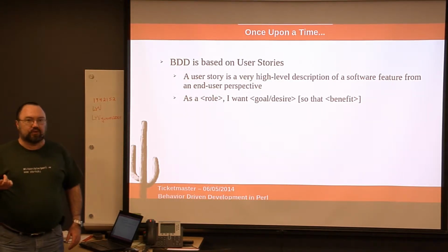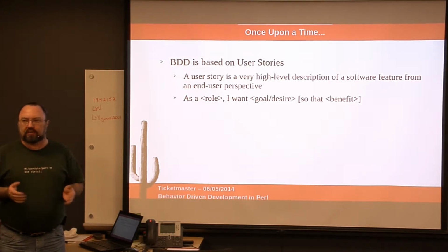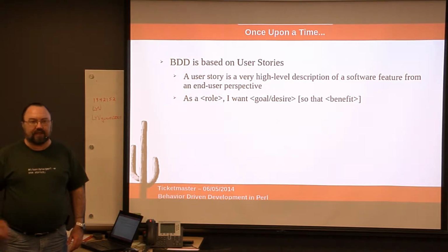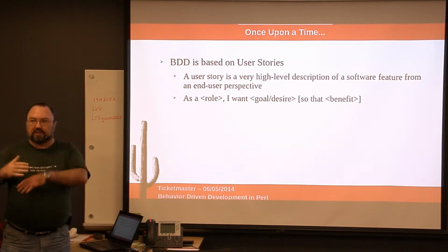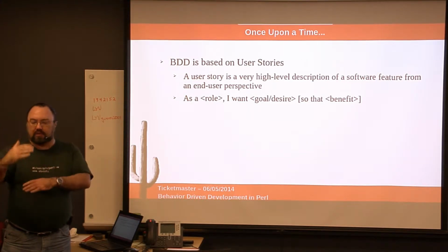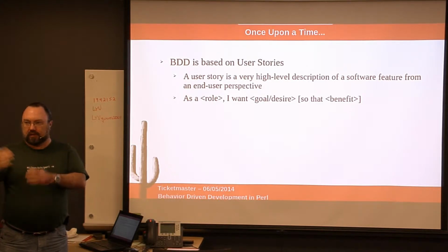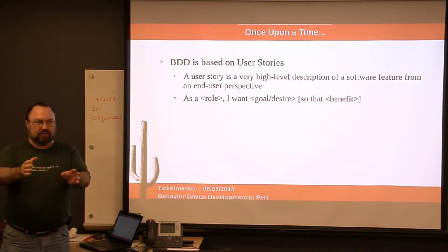So what you do is you work in short time periods called sprints. We happen to have 2-week sprints here. And so you decide, between you and the product owner, how much work we are going to get done. The product owner says, I want these features done.